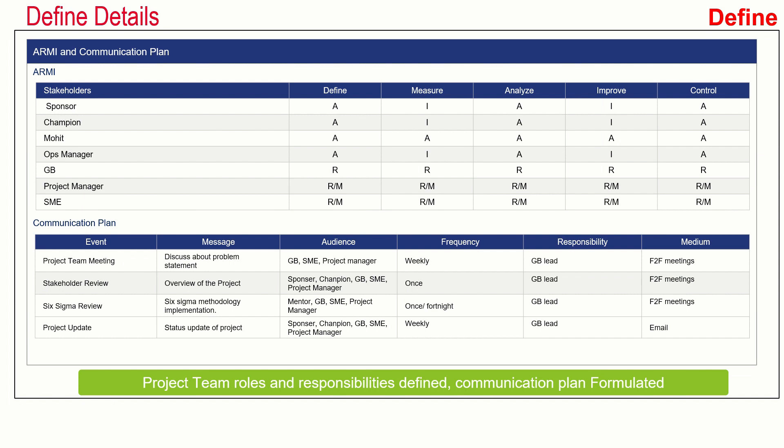The team then created an ARMI chart, defining roles and responsibilities for the sponsor, champion, quality black belt, ops manager, green belt, project manager, and SMEs. A stands for approver — these people approve the phases. I stands for informed. R stands for resource — someone with technical knowledge like an SME. And M stands for member — people who take part in the project, help with data collection, and implementation of solutions.